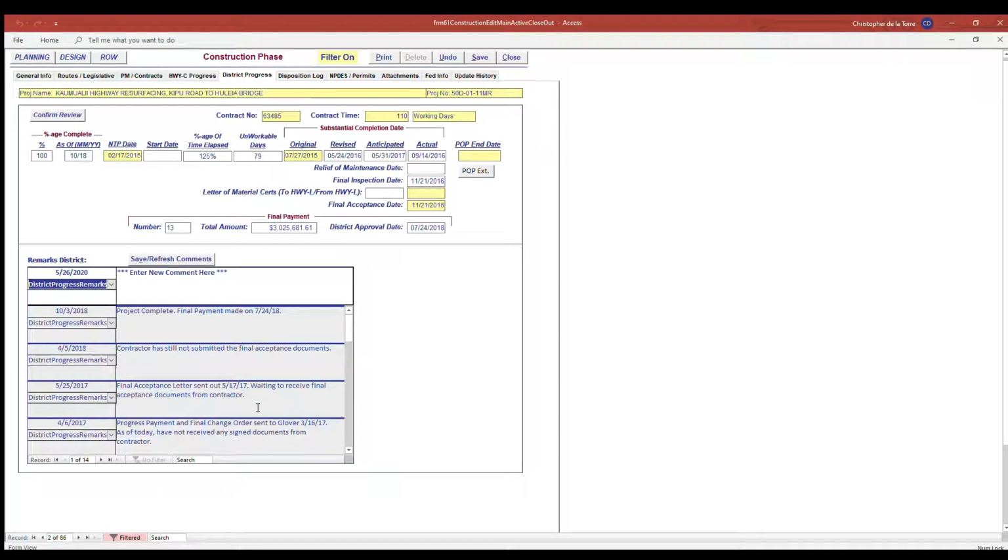2. Time. Note why there are changes to the anticipated substantial completion date, or the variables which may still affect the date. 3. Cost. Note any major changes to the cost that are expected and a brief explanation why. 4. Current or potential problems that may significantly impact the schedule or cost. For example, this one right here: contractor still in liquidated damages, project delayed due to bad weather in the area at night. That was just 4.